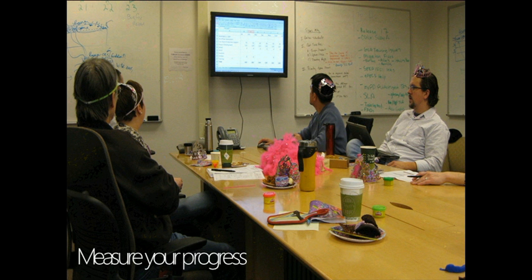You'll have that burn down to tell you how you're doing. You'll have a really good idea of whether you're going to finish the sprint on time or if adjustments are needed. You'll refine your ability to respond to stuff as it comes up. You'll practice negotiating with the product owner to deal with change in the middle of a sprint because it's going to happen. You can't protect your sprint from change any more than you could protect a giant waterfall project from change, and it would be silly to think that you can, so instead you manage it.